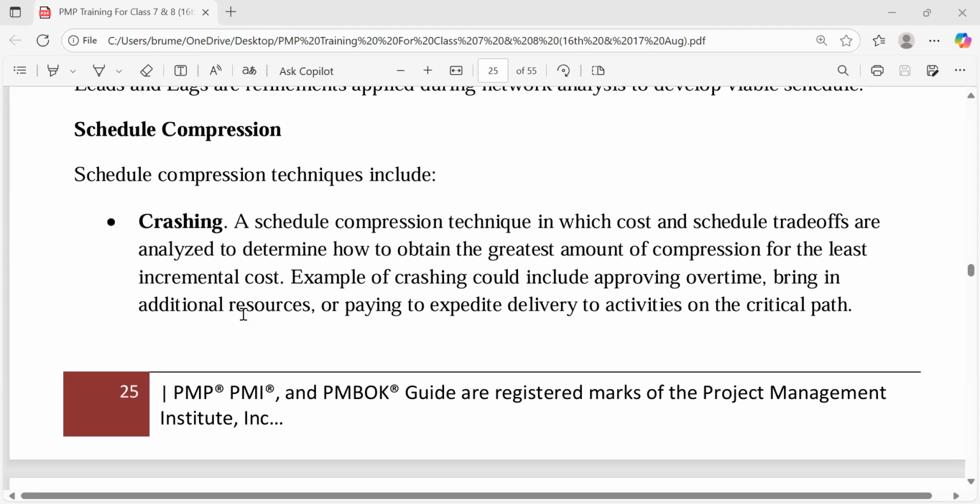You can only do 3 within that time, which put together is 6 hours. And they want to reduce it to 4 hours. That is not possible. The only way it can be possible, they would have to bring in Victory to come and join you, right? With the same capacity. That is the only way you can achieve that job and complete it in 4 hours.